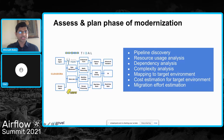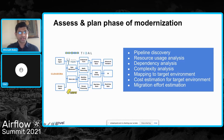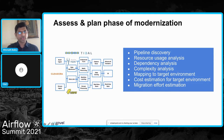The assessment phase involves several steps: first you have to discover all the pipelines that need to be migrated, then understand the resource usage of these pipelines and, more importantly, all the dependencies they might have. As part of this process, you need to understand the complexity of modernizing these pipelines — some that run on-prem can actually have thousands of stages and may run for many hours. Then comes the challenge of mapping these pipelines to the target environment and estimating the cost and effort of the migration itself.